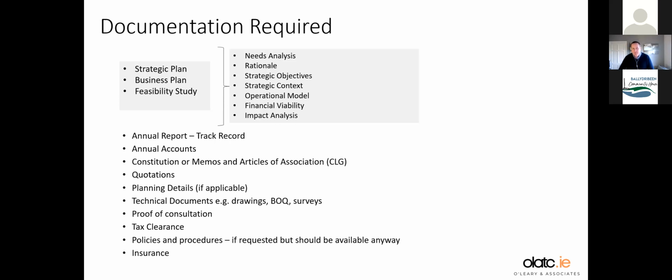We're doing one at the moment for a €7.2 million project. It's for a digital hub and enterprise center, obviously a massive project. The first preliminary stage is a preliminary business case analysis. So we're going to do a building survey, design concepts, and an indicative cost analysis. Then we do the business model, the revenue model, the funding model, and the impact analysis. Does it deserve 7.2 million, and what's the return on the local economy from that? So that's a very detailed assessment.